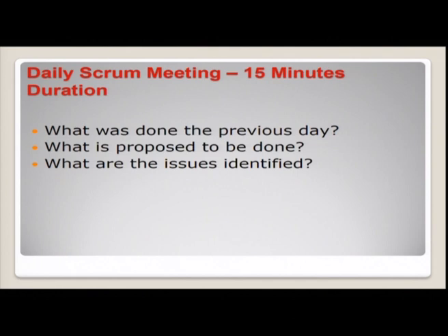What was done the previous day? What work did you carry out the previous day? What is proposed to be done today? What sort of impediments have you encountered? Impediments in the sense, what are the issues that have been identified by you? Where did you get stuck yesterday? How are you going to overcome it?